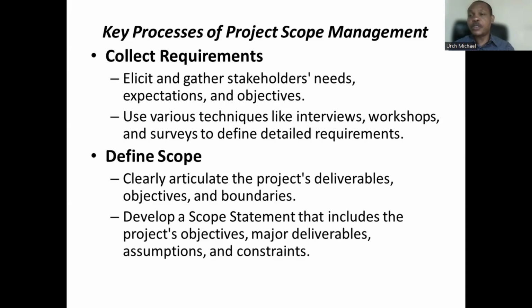If it's a road project, you need to know the road designs, the standard of the road, the material requirements, the length of the road, the breadth of the road, the hierarchy of road you want to construct. With proper calculation, you should be able to have a better understanding and accurate measures of the material requirements, the staff requirements, the financial requirement and all that. So that is what collect requirements is all about. And after this, you have a clear understanding, then you define your scope.